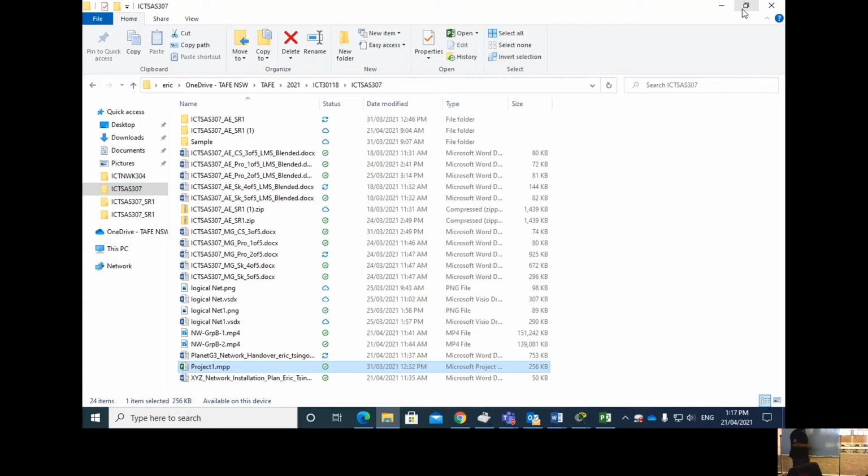Right, so they're probably the 3 key milestones. First part is analyze and design a solution. Analyze the problem, design a solution. That's what we did first. They said, this is our problem. We go, well, we can solve it this way, work out what stuff we need, and design a solution that'll fulfill that. So let's say we had a week to do that. Yeah, so let's give that 1 week.